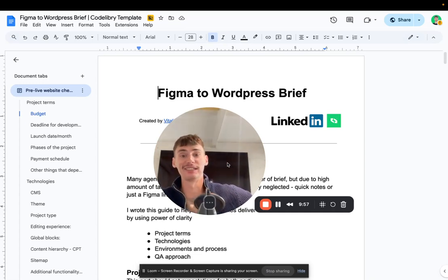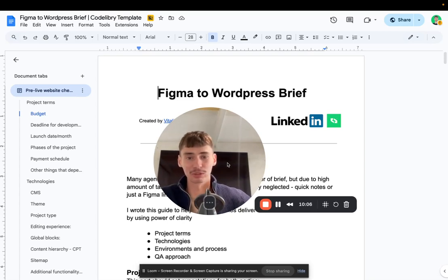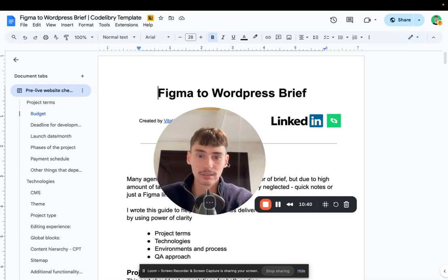So if you're using a freelance platform and you're a contractor, make sure that as much as possible of the total budget is funded upfront. Even if you don't have access to that money, if it's funded on the platform, that's great. Fund them, start working. Same for agencies, but in a different way. If you want to be sure that work goes as you expect, make a few milestones. Average milestones are homepage development, inner pages development, and then quality assurance. And the last one is the remaining part when the website goes live. That's how I see it.